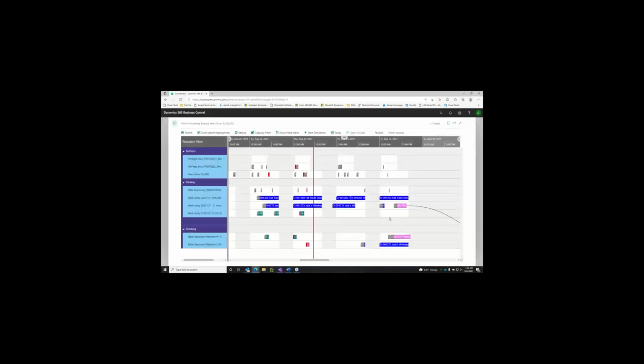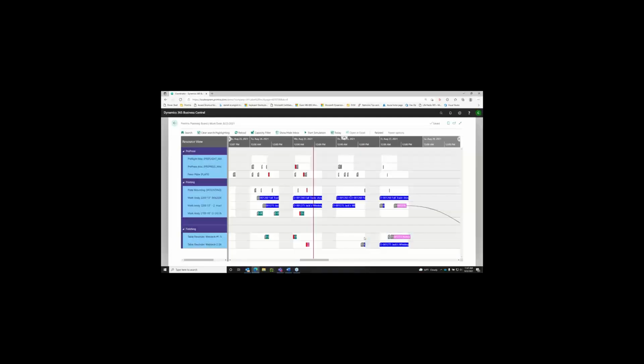It allows the user to better understand where you can place the job, what beneficial place to place the operation. If they're similar, based off the setup, similar cost centers or machines, you can easily move it from the WebTech 2 to the WebTech 1. Perhaps there's more capacity availability on that WebTech 1, so you can easily just drag and drop it. There's a lot of dragging and dropping, and perhaps you want to move it from one machine to another machine, and also to another time.